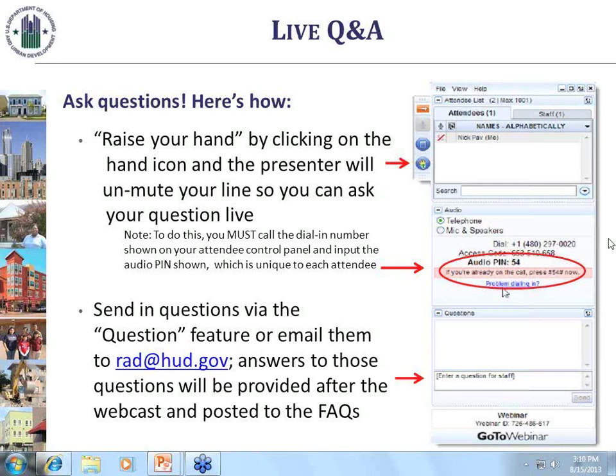We would divide by 20 years, which is the length of the HAP contract. We would divide by 100 units, the number of units at the site you're converting, and then divide by 12 months, and we'd come up with a PUM. Essentially, that example would add about a $29 bump up in the contract rent. So if the contract rent previously had been $600, it would now be $629, and the government would be indifferent about giving you $29 a month in added rent for that project, or giving the agency 7 more years of $100,000 a year. So that's how we would take the future income stream for the RHF and put it into the project.